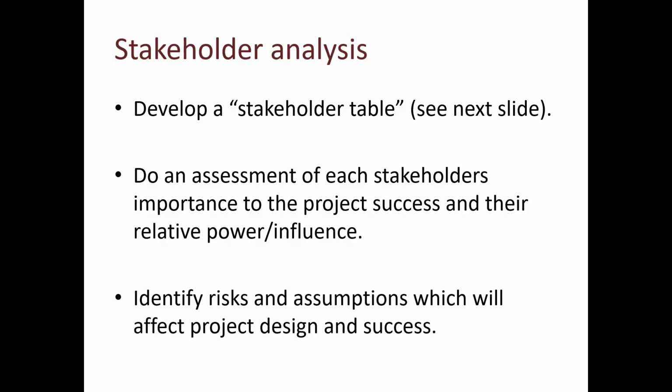Neutral will act as follows. He said, no, I can't give you the data because it's confidential, but it's fine. Stay for whatever you want and collect the data you want. However, the supporter here will give you the data immediately. I hope with this analogy, you now understand the difference between resistant stakeholder, neutral stakeholder, and supportive stakeholder. We don't have any problems with supporters and the neutrals, but we do have a problem with the resistant. And so we'll be focusing on this.